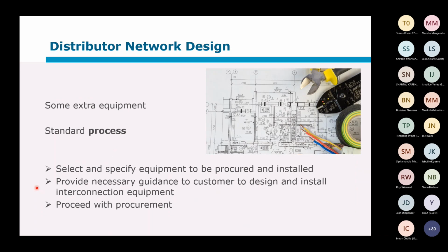Now, again, once you've selected all the equipment, it's good to have the due diligence, at least meet and discuss the equipment that's been selected and make sure that all of these are correct. I think we see very regularly, and we hear in the news with all the issues that, for instance, Medupi and Kusile have, it's very easy, even for somebody with a lot of experience, to miss something. And that's why it's better to have somebody outside who wasn't that involved with the project to just look at what you've done and double check that everything is correct.